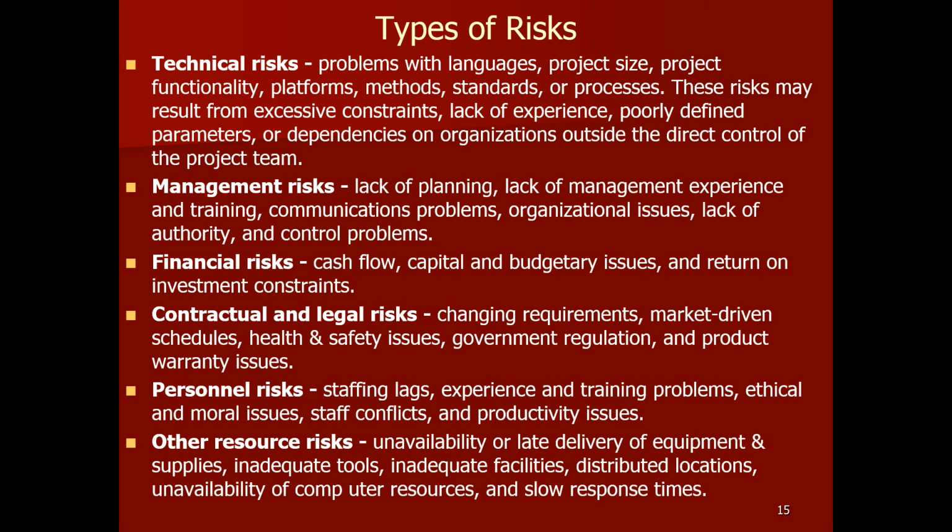Financial risks are big: cash flow, budgetary issues, and making sure... sometimes you can start a project and the finances are in one place, but as you continue, and this could be a 2-year long project, everything's changed. For instance, just take a look at the price of oil on the market right now. That's caused a lot of changes to oil companies and oil exploration over the last 6 to 9 months, and a lot of projects that have been started are now put on hold. So you have external things that can happen that can change the nature of a lot of projects.